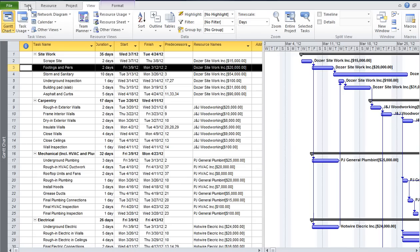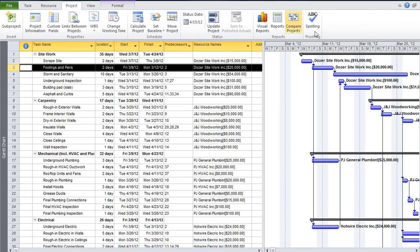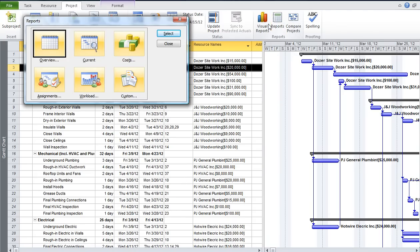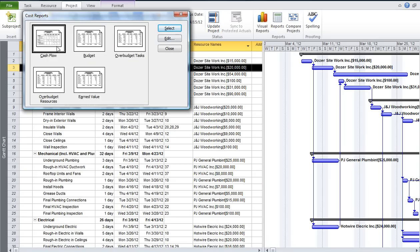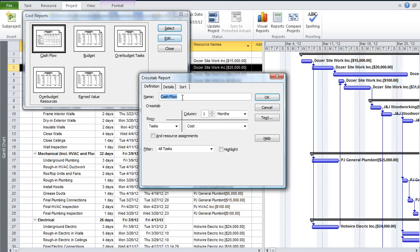Now once that's in place, we can run reports. If we go over to Project, here's the Reports choice. Let's take a look at a cash flow report — that's under Cost. There are five reports under the cost options, but we're going to use the cash flow one. I'll edit that first. There are two different ways to run it: by resource or by task.